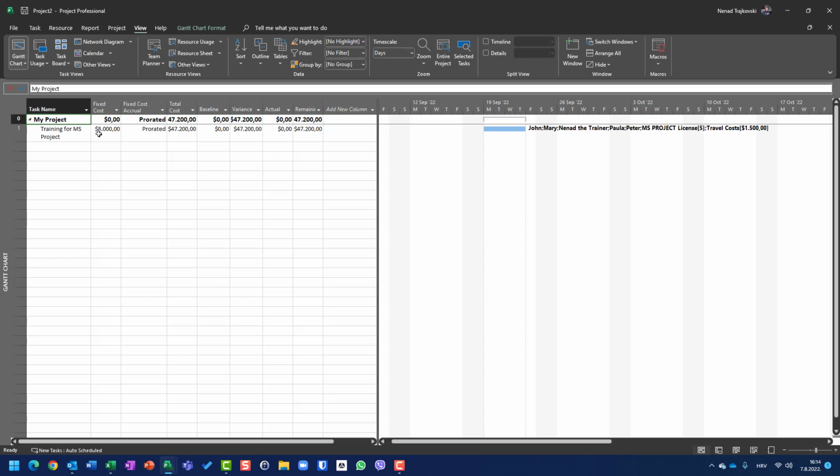But now, one hint, if you have, for example, let's say lunch will cost us $8,000, but let's say flip chart or projector or whatever will cost us another $2,000, then you should put the total amount. You cannot have, let's say, a drill down here about fixed costs. So if I have, for example, $8,000 for meal and $2,000 for flip chart, it will be $10,000.